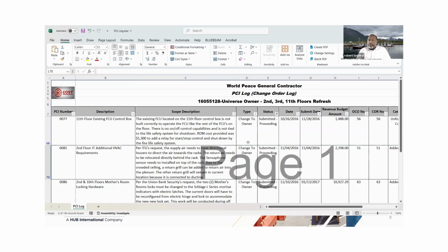And also you want to be able to bill for that. The longer these stay open, you can't invoice them. So I like to reconcile once a month if you're there several months. Reconcile, get them approved, push them through, get the signature on these change orders, so you can then add it to your contract value, because that's going to increase, so you can bill for it. Any questions so far?